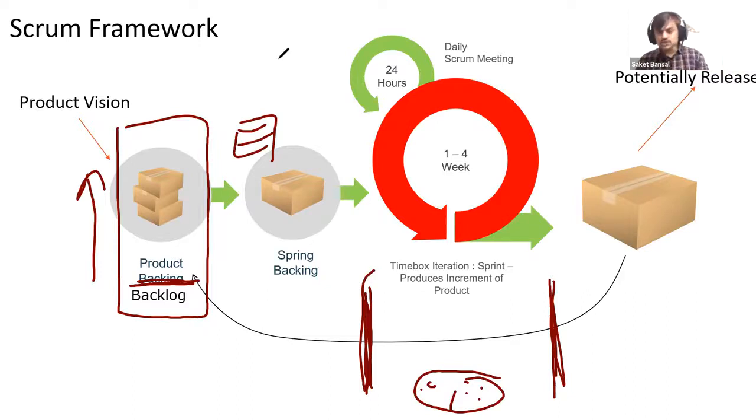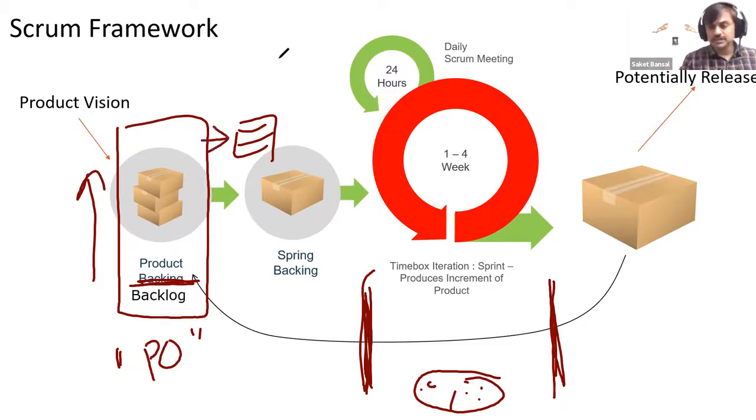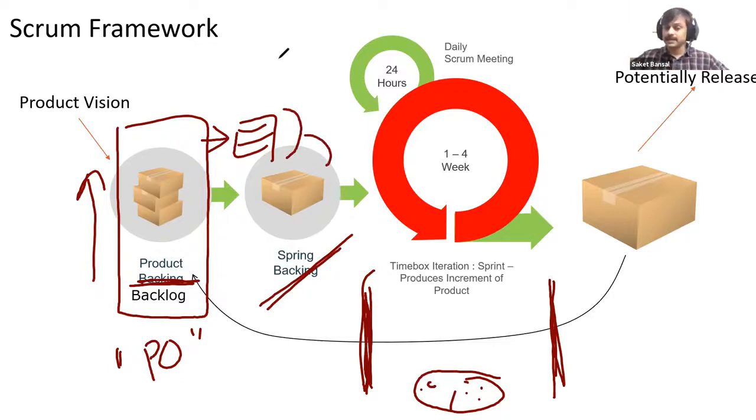So we take those two things. There is a role called product owner, a person who is responsible for working with the stakeholders and keeping it managed. We pick up some ideas which can be done in the next 2 weeks, a sprint duration. Then the team creates a detailed work breakdown structure, a detailed plan for this element only. That's how we do progressive planning, progressive elaboration here.